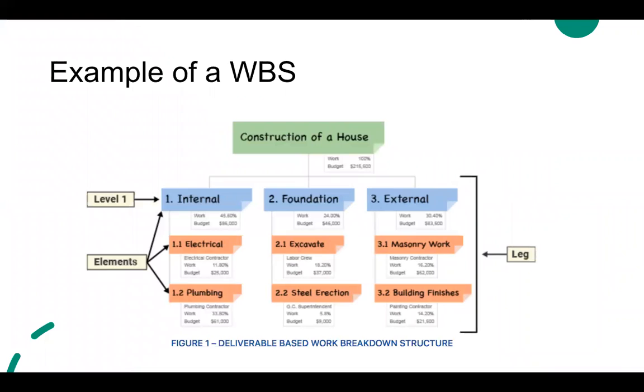An example of a WBS. Here is an example of a deliverable based on a WBS. This is a small WBS compared to those that may be developed for some projects, but an important component of a WBS is the amount of detail included. The more detailed the WBS, the more tasks identified to accomplish the work, and the easier it will be for the project manager to assign tasks to the project team.